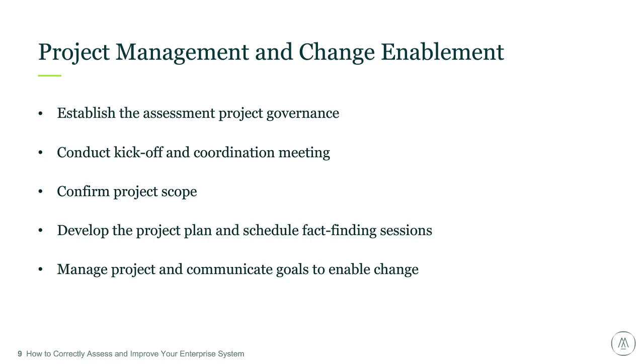Then you conduct a kickoff and start coordinating with the project team members. And one of the first items on your agenda for that kickoff should be to clearly agree on the scope of the assessment project. What are the system issues you're trying to resolve? What are the goals?